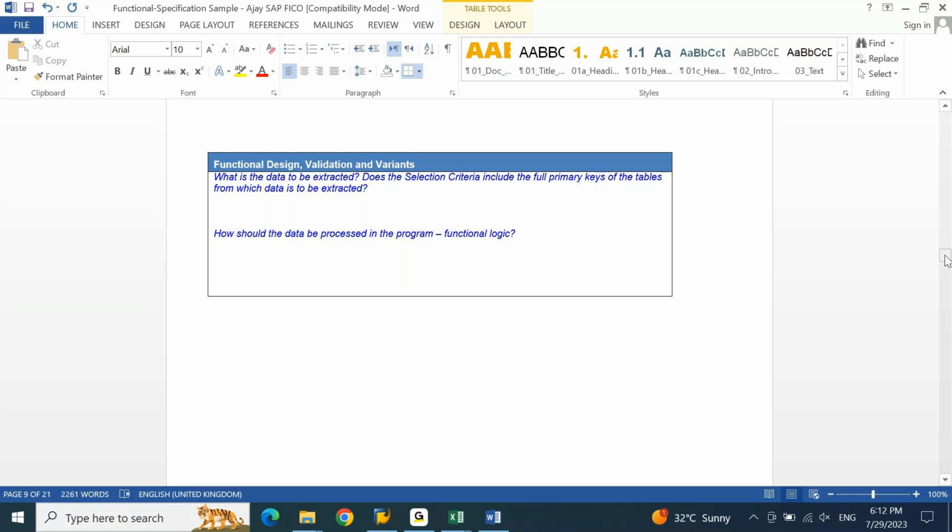When I say you will be charging your client for this development, I would have given the effort estimation for 1 month. Let's say 30 days effort I have provided. When I give 30 days effort, every day is some amount. Let's say 1 day, this is the charge. Likewise, per day charge or per hour cost multiplied by 30 days or multiplied by number of man hours. If you are giving me another requirement, if you are giving me the corrections changes, I will tell my effort estimation will be increased by 3 more days or 1 more week.